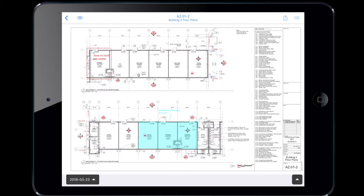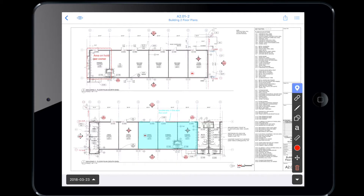Now let's talk about deficiency tracking. When most of our team is working remotely, we'll want to provide more updates. We can do this by taking photos and videos of the items when they arise, when they are being worked on, and once they're finished. This way, our remote team will know the exact status of the items and can jump in with questions along the way. Today, I discovered a damaged carpet tile that needs to be replaced, so I'm going to create a task on the plan to track the work.